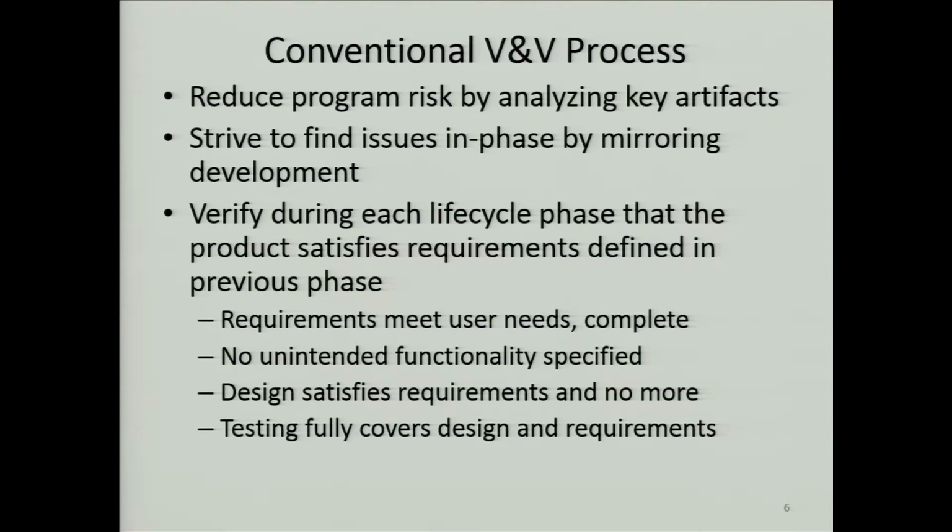Striving to find the issues in phase by mirroring the development effort. So the V&V team gets started almost at the same time that the project starts, and stays in sync as the project unfolds. So in each life cycle phase, we're verifying that the product of that phase satisfies the requirements imposed on it by the previous stage. That requirements satisfy the user needs, that there's no unintentional functionality, the design satisfies the requirements, and then the testing fully covers the design and the requirements.